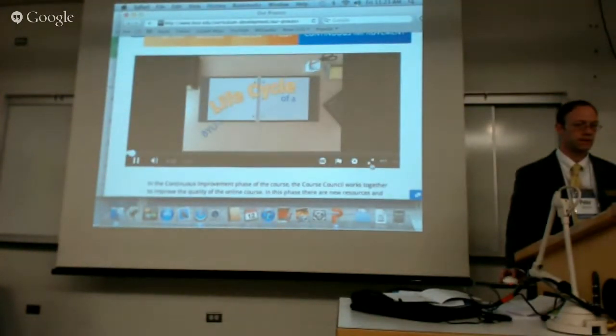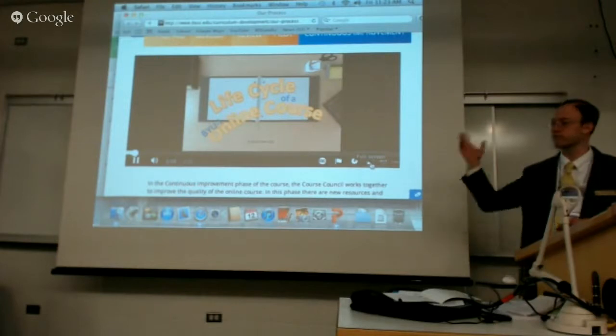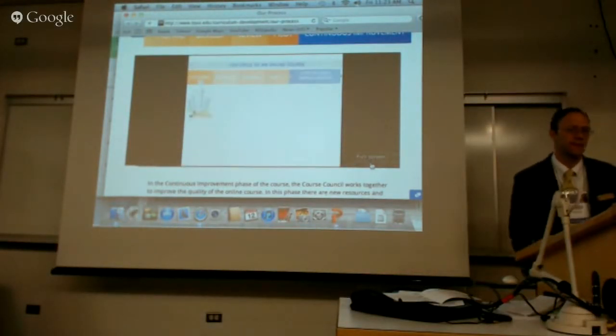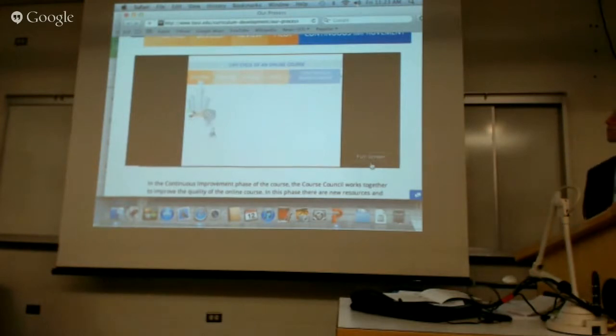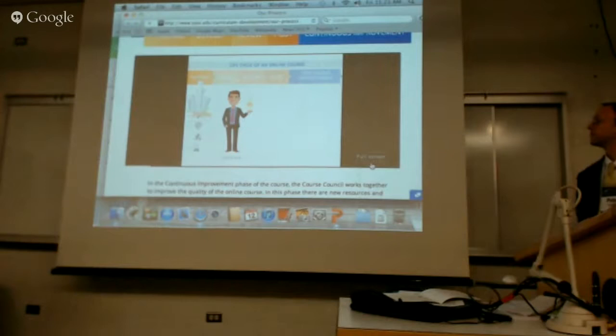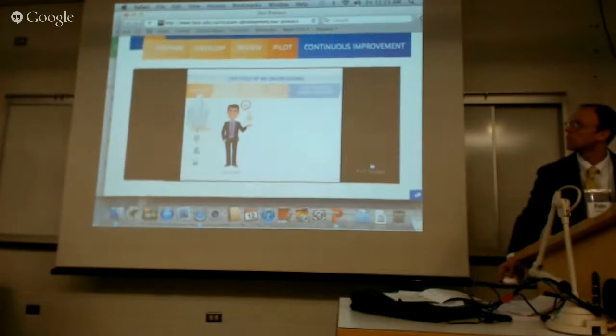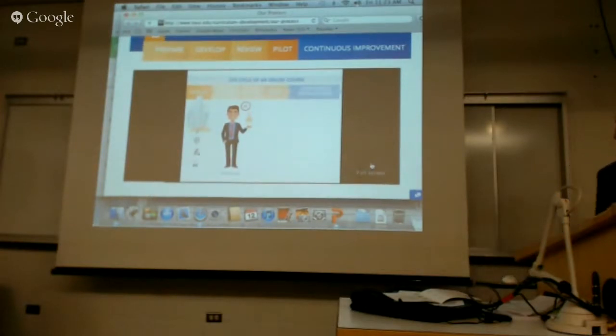Life cycle of a BYU-Idaho online course. First of all, the Dean's Council works with different colleges and departments to determine which classes will be developed into online courses. Once a course has been selected, the department appoints a course lead. A course lead is a department member who has experience teaching the face-to-face, on-campus class. He or she acts as a subject matter expert. Since this vital role requires an extensive time commitment, departments will accommodate for this time in the course lead's teaching schedule.